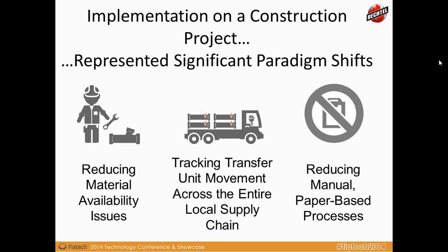Okay, so I guess everybody that's ever been on a job site has seen this same guy, the hard hat and the pencil. This guy is a member of the material management organization, and he's manually updating the receiving logs to reflect the items, in this case structural steel, that's being delivered. As I mentioned before about the information lag, the typical total elapsed time to receive all the steel was estimated at around 45 days on this particular project. So on the next slide, please, Stuart.